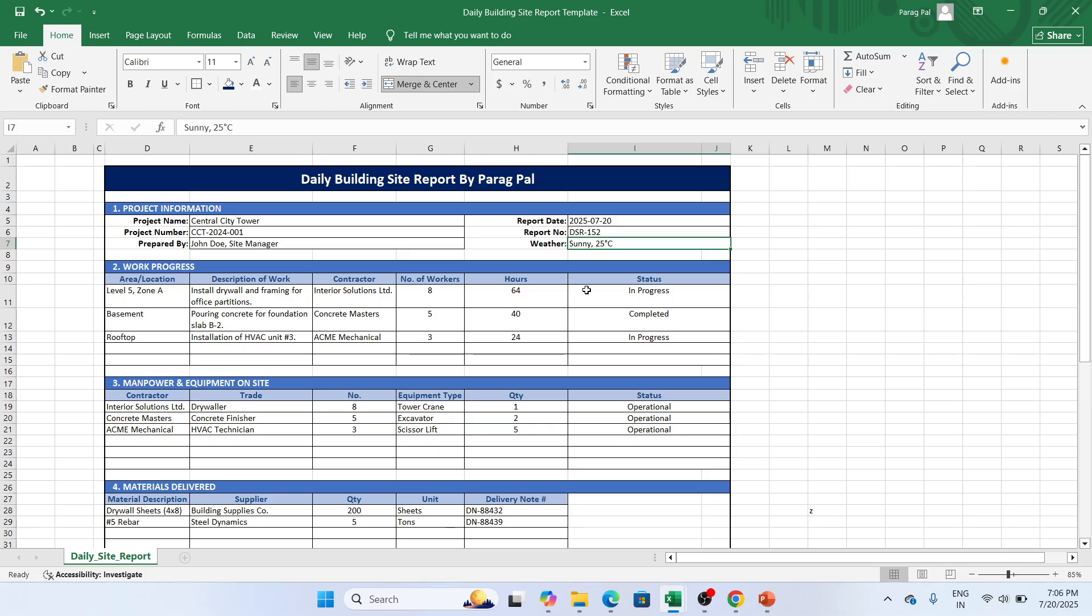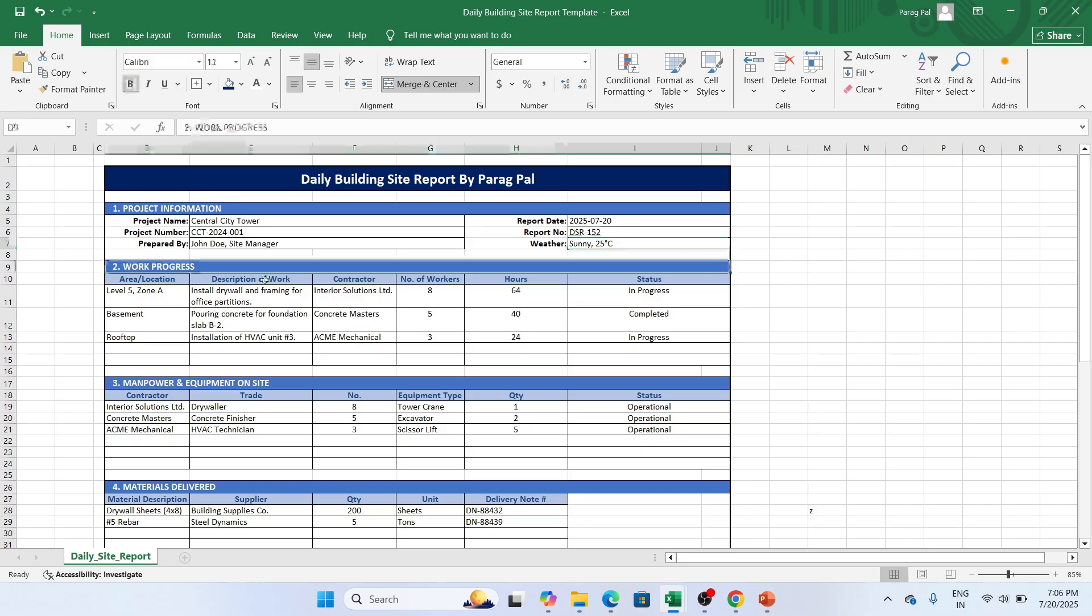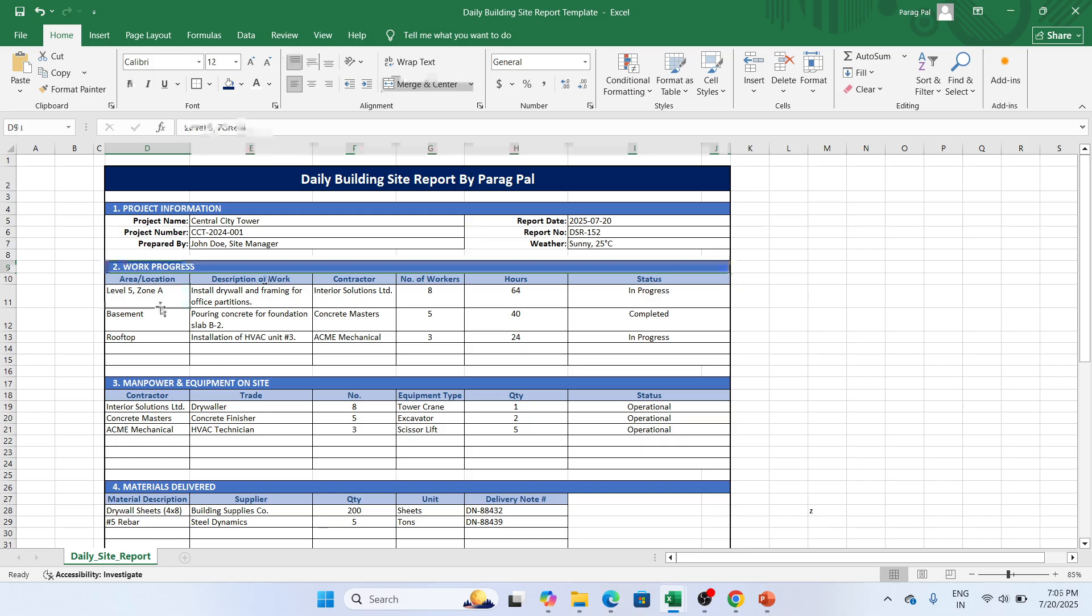In work progress, we have different categorization such as area, location, description of work, who is a contractor, how many number of workers, hours, and the status. So you can see I have the area level 5 zone A, whereas my work is going in structural install, drywall and framing for office partition.